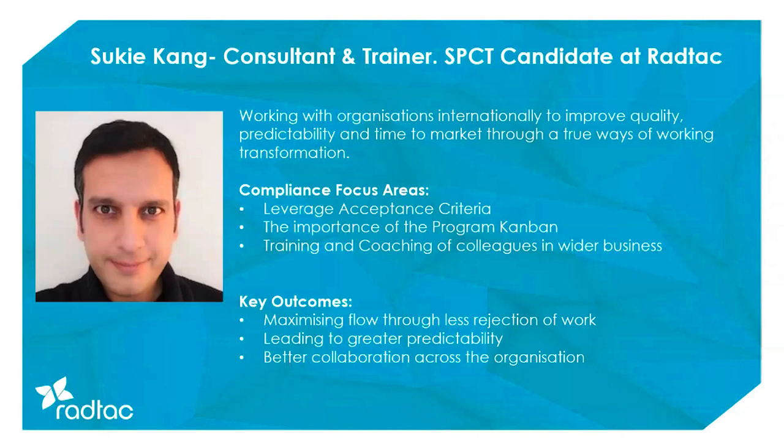So I've actually seen both scenarios. I was involved in an ART launch in a UK government agency. And there, as you can imagine, there was a lot of compliance and regulatory obligations. So in that particular scenario, we had a dedicated compliance team who were actually part of the Agile release train. However, in other organizations, compliance tends to be more of a shared service. So the Agile release train is one particular area of concern for them and the work that the ART is delivering, but they are outside of the ART and they have other areas of concern elsewhere in the organization.